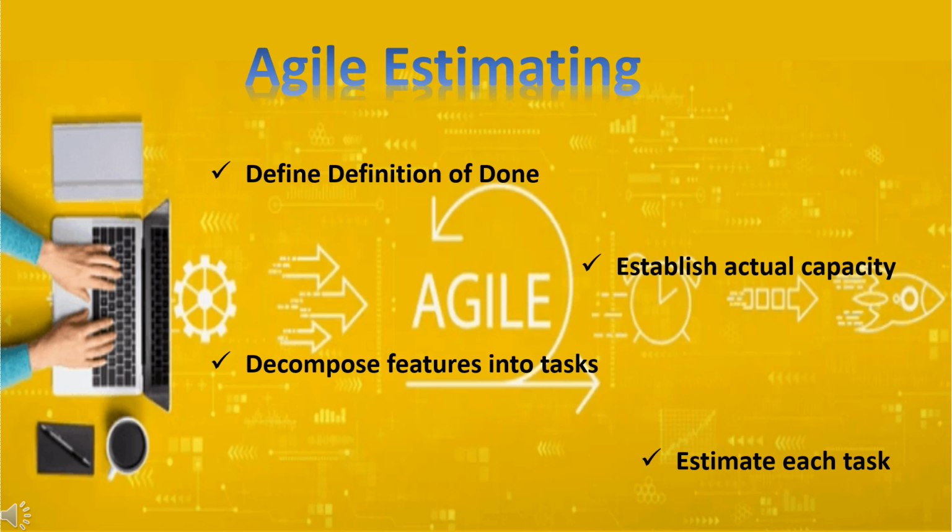Let's review agile estimation. First of all, create the definition of done, and determine the team's velocity. That's an observation and not a prediction; it's based on historical information. Estimate the user stories using story points. The size of the story points needs to include considerations for risk, testing, and acceptance by the product owner. And once the story has been selected for a sprint and disaggregated into tasks, each task would then be estimated in ideal time, then converted to elapsed time.